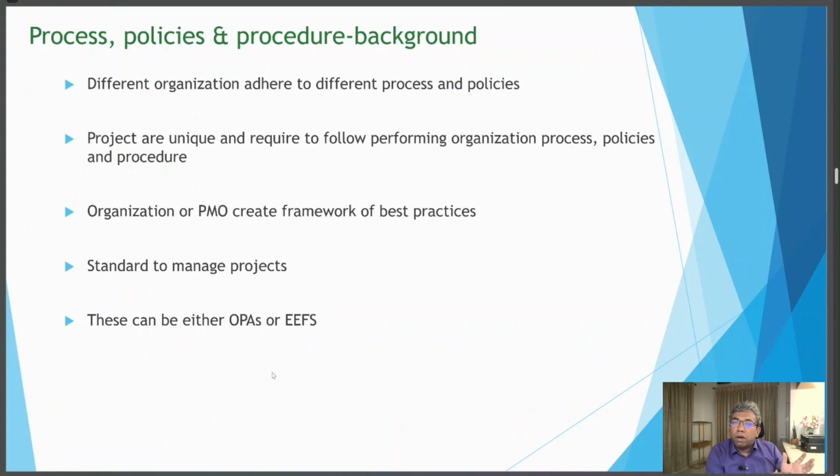There may be a lot of processes, and each department may have different types of processes and policies you are required to follow. Normally those processes and policies do not create a bottleneck for your project, but if it is a hard logic, that means you have to maintain it, then you may consider it an EEF. But if it is not creating any constraint for your project, you can consider it an OPA.